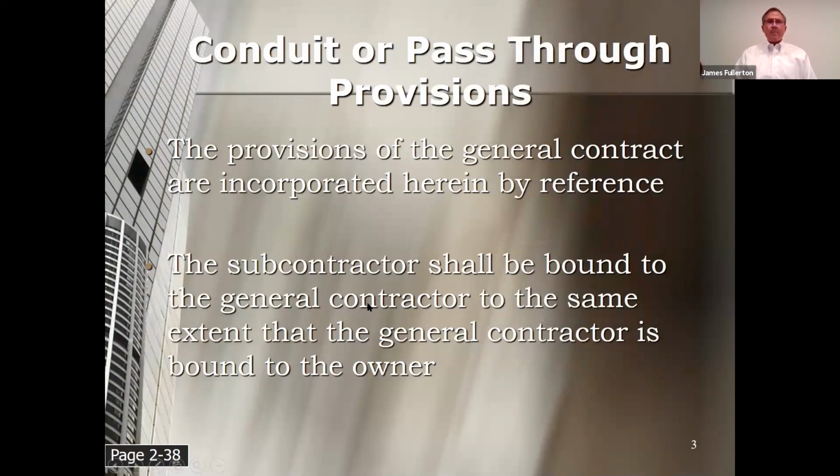All right, so discussion of conduit clauses starts with the contract terms. Both of these sentences probably look familiar to you. You've seen them many times. They are in almost every contract you ever sign. Certainly if an owner or a GC is sending you a contract to sign, it will have a conduit or pass-through provision. As far as I am concerned, those terms are synonymous. And these two sentences we're looking at are synonymous. They're just different ways of wording the same concept.